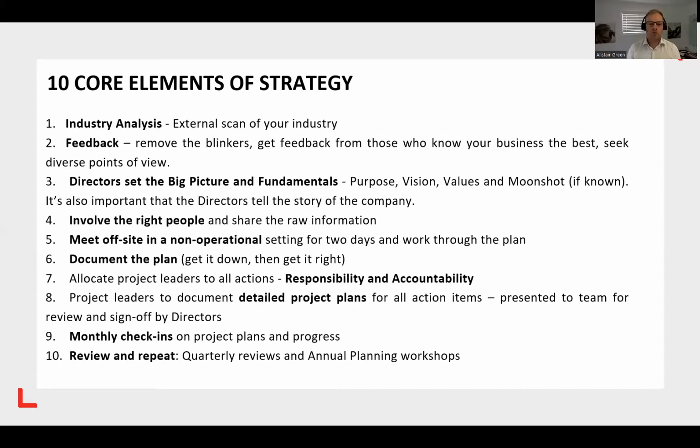Right, most of the work is done. Now we move on to monthly check-ins. So you as the leader of that organization or department, this is where you come into your own, and I want you to check in on every project leader once a month. A one-to-one, quick. It only needs to be a few minutes, but make sure that it's based around the project plan itself. Don't walk up to somebody and say, hey, how's that project going? And then accept a, yep, all good, it's in progress.